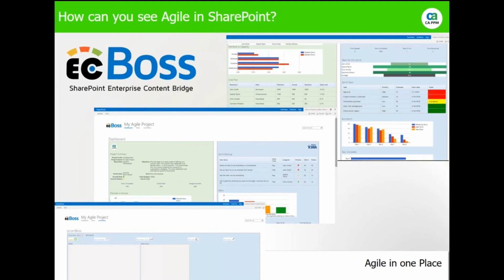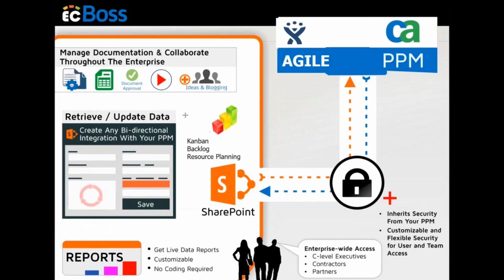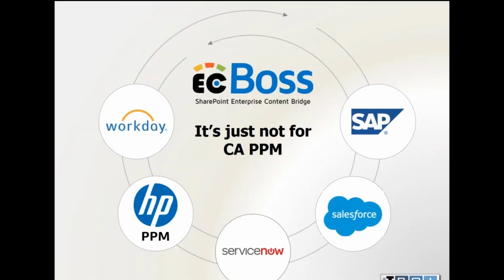Then we have project health. Project health is a summary metric that indicates if a project is on track, needs attention, or is in trouble. This metric varies by organization and is calculated using conditional logic based on the 4 metrics above, as well as all other data such as outstanding issues. One of the simplest ways to calculate project health is to compare actual percentage complete with the expected percentage complete based on the start date and the scheduled finish date. A project health status of needs attention or in trouble is often triggered when projects are not delivering business value, there's significant scope changes, costs exceed budget, or there are major unresolved issues in the project.